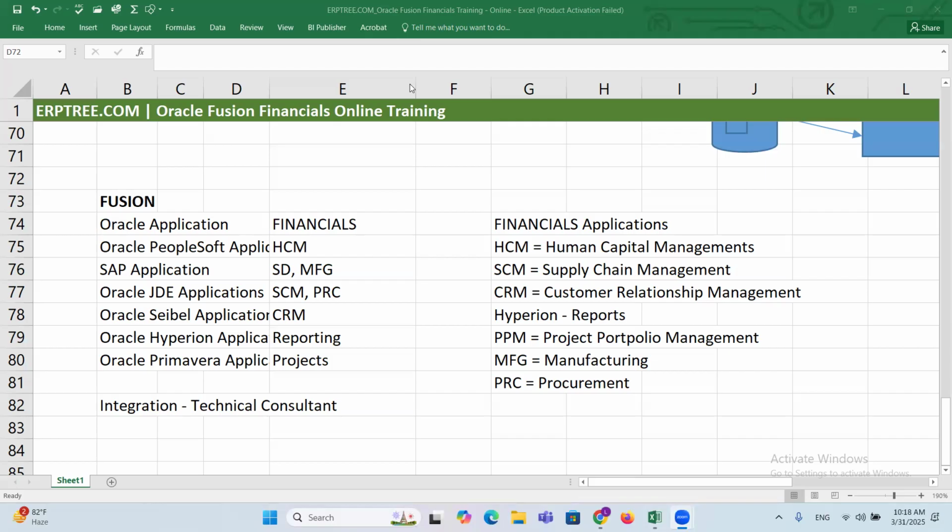Sales, pre-sales teams and other experts who are very senior team members involved in that evaluation of the client business processes, they clearly define, hey, if you need any integrations, these 5 integrations we can offer you for free as per this contract. More than 5, we will charge. And they clearly say, whatever is possible as per the Oracle product, that only we can help you with. If you want us to create something new, we need extra efforts by our technical team. We will charge you.